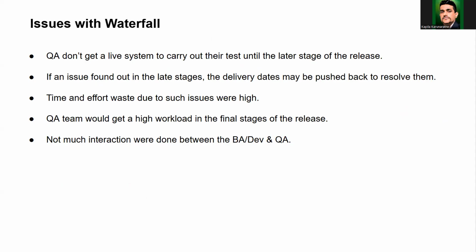There are some concerns in the waterfall. Basically, in waterfall the testing will be done at very later stages, and if something went wrong in the requirements or in the initial stages, you have to go back to the initial stage and redo it. There is a lot of rework, and it is a complete waste of time. Especially the QA team will get a large amount of work to do at the end, and they will really be burnt out, and it might not deliver value. Those are the basic issues we discussed, but there are many other issues.